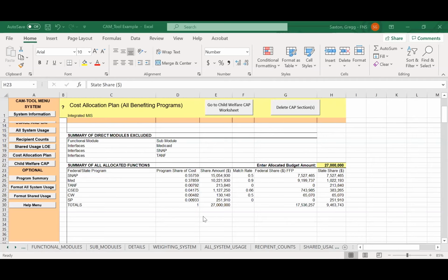Okay, great. And I believe you just answered this, but I'll just ask it again. Is the cost here just implementation cost? Yes. This is purely because operational costs are the responsibility of the cost allocation agency within HHS, and they work with the states to develop an operational cost allocation that's separate and apart. But this is a special instance where for systems projects, due to their size and complexity, we allocate costs, and because generally systems don't benefit all the programs the state is operating, we have a special cost allocation for this project.